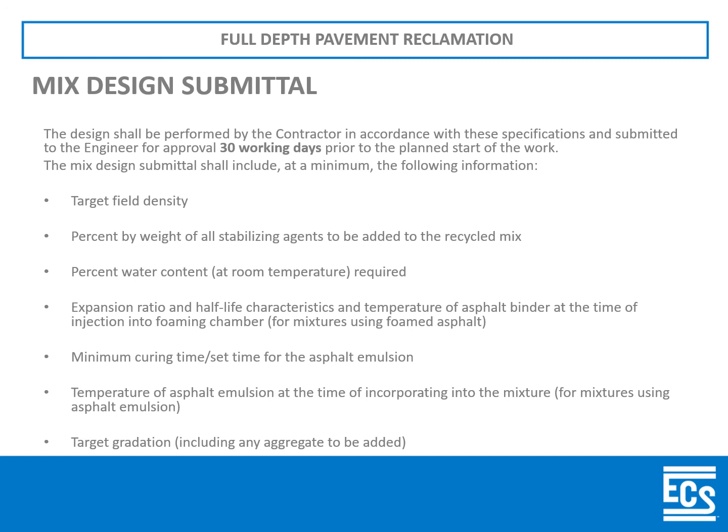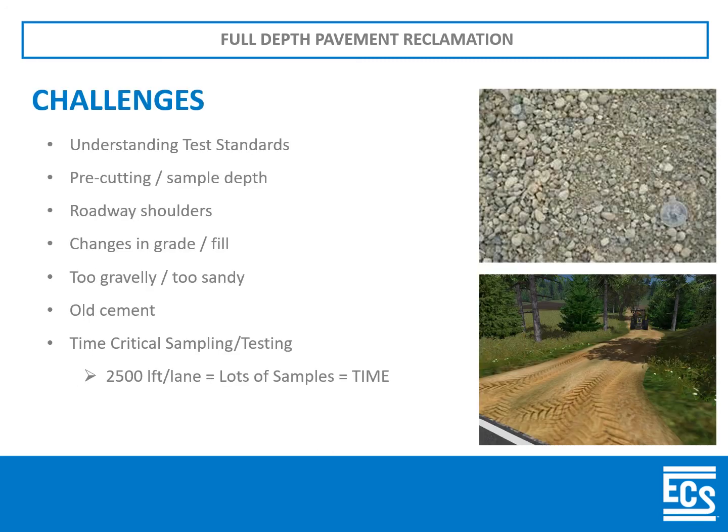Each proctor will have its own cement point, which requires 3 at each particular location. That's a lot of sampling to process, and you have to make sure you have the time to conduct the test. Then after you do that, you have to let it soak for 7 days before you can even break it.